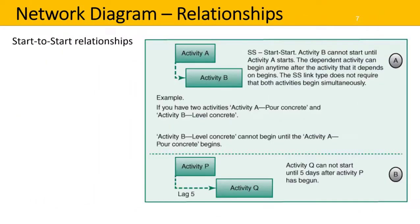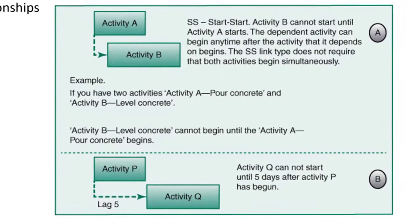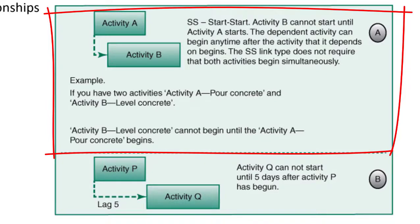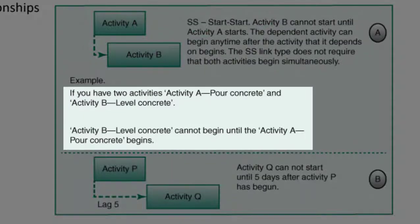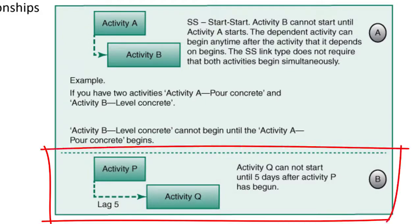Here we look at start-to-start relationships. At the top, A: activity B cannot start until activity A starts. The dependent activity can begin any time after the activity that it depends on begins. The start-to-start link type does not require that both activities begin simultaneously. For example, activity A is pour concrete and activity B is level concrete — activity B cannot begin until activity A begins. And for B, activity Q cannot start until five days after activity B has begun, showing that lag.